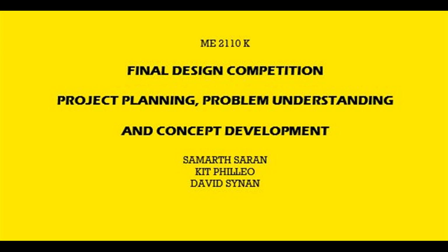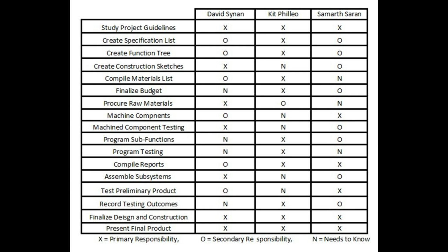along with a summary. This job responsibility matrix was created to identify the responsibilities of each team member while also specifying the level of responsibility that each member would fulfill in completing their tasks. Now, given the small team size, it would be rather difficult for us to free any member of responsibility for any of the tasks. Hence, we decided that every member would hold some level of responsibility in fulfilling every task that we had. Assignments were made based on a trade off between the team member's skill, interest, and availability to perform them.